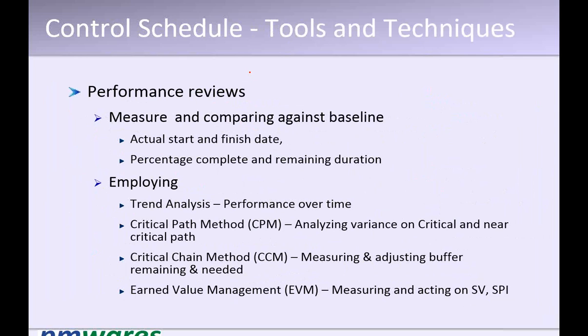Which we refer to as integrated change request management as a part of integration. Right? Yes, and including this change request also. Corrective, preventive measures and defect repair are also treated in the same manner in the change control system. Their change request is change in corrective measure, preventive measure, or defect repair, or change in scope, new addition into the scope. All of these go as a change request input to the integrated change control.